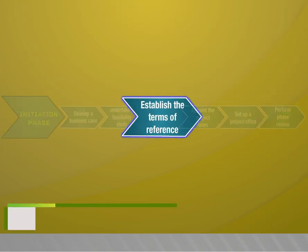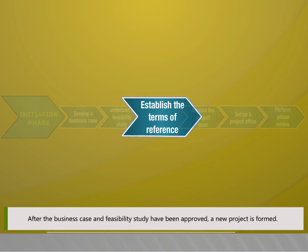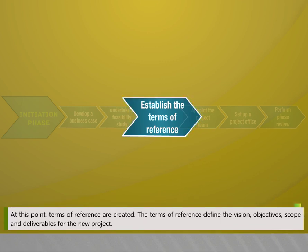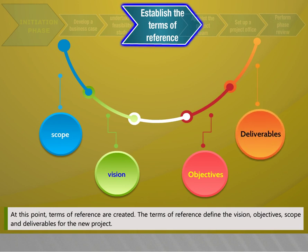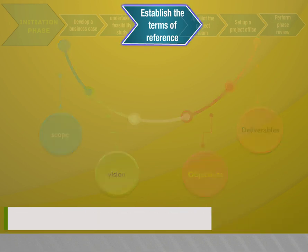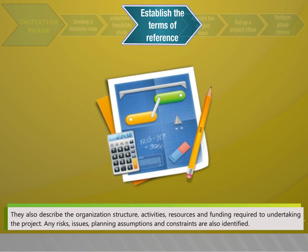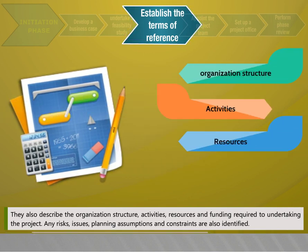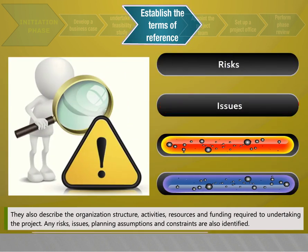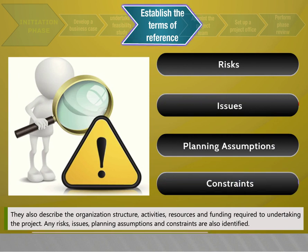After the business case and feasibility study have been approved, a new project is formed and terms of reference are created. The terms of reference define the vision, objectives, scope, and deliverables for the new project. They also describe the organization structure, activities, resources, and funding required to undertake the project. Any risks, issues, planning exceptions, and constraints are also identified.